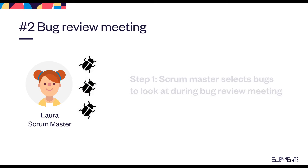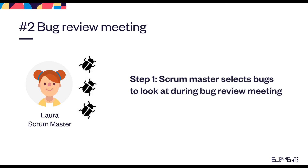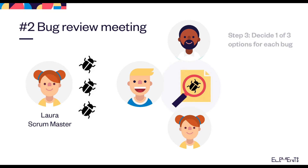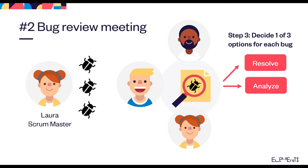There are three steps to this use case. Step 1: the scrum master selects bugs to look at during the bug review meeting. Step 2: during the meeting the team goes through the bugs. And step 3: the team will decide one of three options for each bug — resolve or fix, analyze for further understanding, or close if it can't be reproduced.